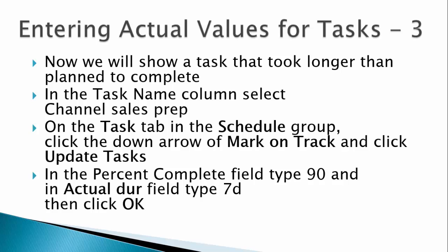Now let's show how channel sales prep is taking longer than expected by making it 90% complete with an actual duration of 7 days. In our current plan, channel sales prep has no successor tasks, so it moves out in the timeline, but does not affect the overall project.